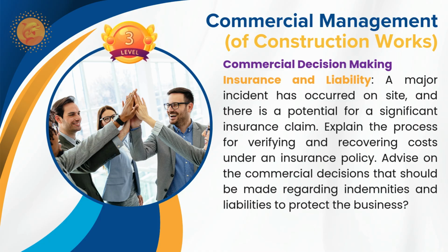Yes, please. When these insurance type questions come, we also have to inform the panel that we have taken proactive measures to reduce the losses. That is one 360-degree view of the answer. We should show how we were proactive to avoid the losses. Whenever we get weather notices or early warnings, we should take proactive measures.